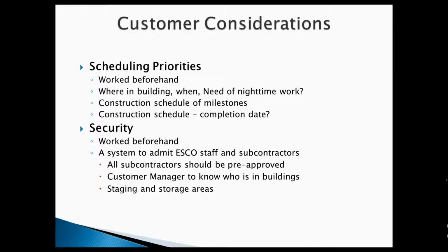Do you need nighttime work? Some places are operational all the time. During the day, you don't want contractors in there changing lights on ladders over people working at their desk. So you may need some nighttime work, and you want to make sure that that is scheduled beforehand.